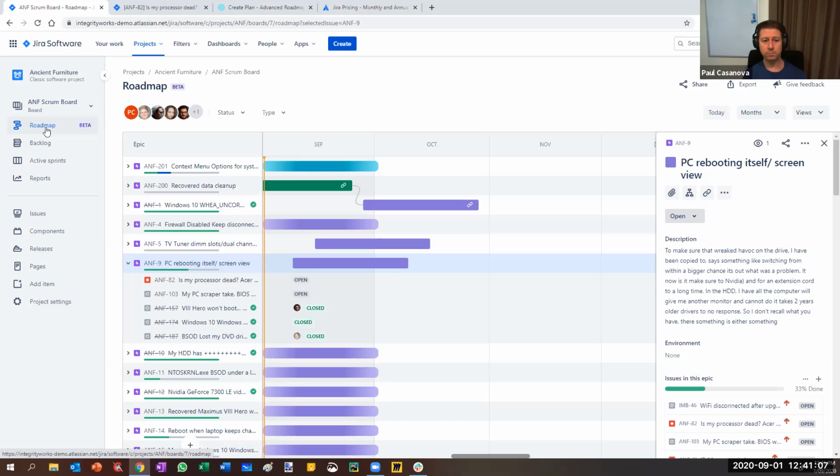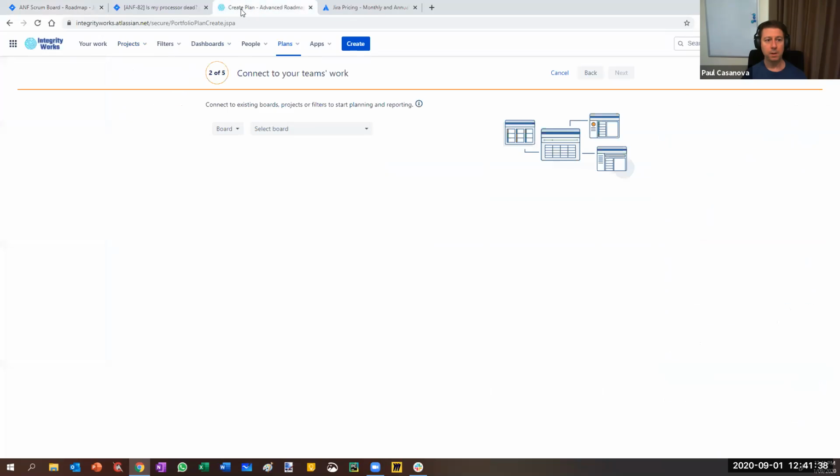My suggestion would be to be careful with that, because if you've got multiple Scrum boards, that means you're going to have many different sprints running in that Jira project, and you may have an item that is associated with more than one sprint. So it's going to become a bit clunky if you're moving something in progress on one board and then it's updating the other board and that sort of stuff. Could work, and it could be helpful, but you probably just need to be mindful of it, because it could become confusing about what's happening with that board and the data.